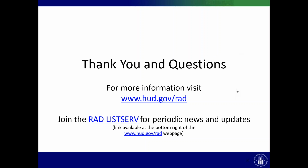Question about closeout costs and whether we can elaborate on that a little bit further. So any PHA that's completing the conversion of all of its public housing units, then subsequently, unless it's planning to produce more public housing units under its Faircloth authority, would be expected to close out its public housing program, which includes certain audit costs and other legal costs that the PHA should make sure it's budgeting for. And so we're clarifying in the RAD notice that those costs should be covered by either public housing funds that it's retained or by some unrestricted funds.